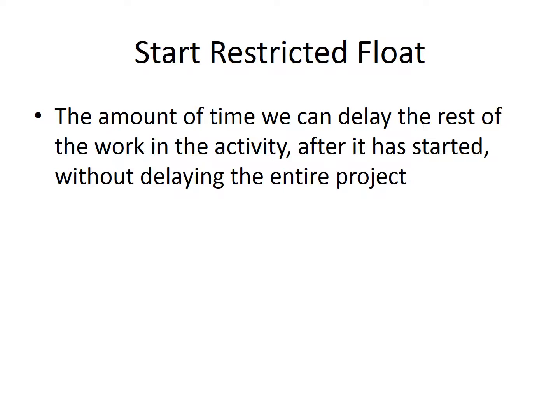But really only the start of that activity is critical. I can clear the rest of the site with a little bit of flexibility built in. So start restricted float really means that the start of the activity is restricted and there's some float in the remainder of the activity.